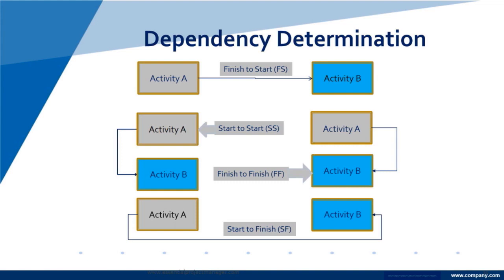In corporate work, we do things differently. We could start our design work before we start our development work for a certain application. So you might need to have an idea of where you're going, big picture design. What's the language, the format, the platform you're going towards before you can develop? But you might be able to start your development after you've started your design. But the design must come first. So that might be an example.